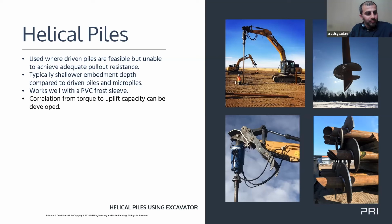That way the client gets the information in real time, the engineers get the information in real time, and they can assess that and evaluate the install criteria right away and catch those piles that may need remediation before they get racked. Often the racking crews are right on our tails. So by digitizing everything, it works really well. I find it's definitely the way to go.